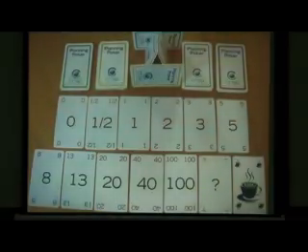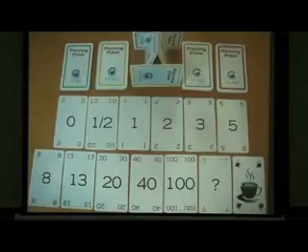So for solving that, the game is to have some cards, like poker, and when you have to say how many hours or how much time a feature is going to take, you choose a card, you put the card face down, and when they say, okay, now everybody turn over the card and see how much time it's going to take. So this is a funny situation. It's like a game, but you are actually working. And I tried this and I worked with this, and I think it's really nice.